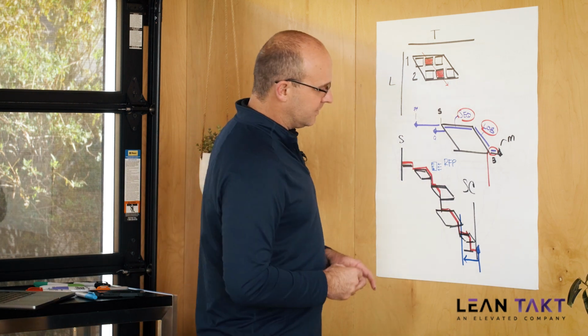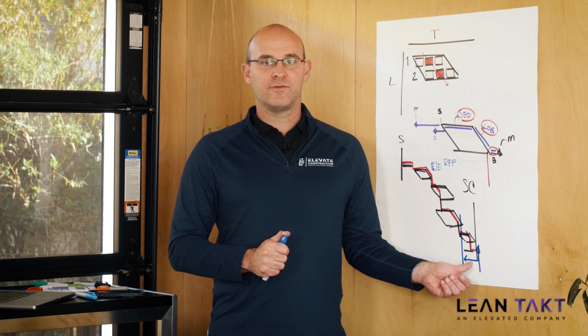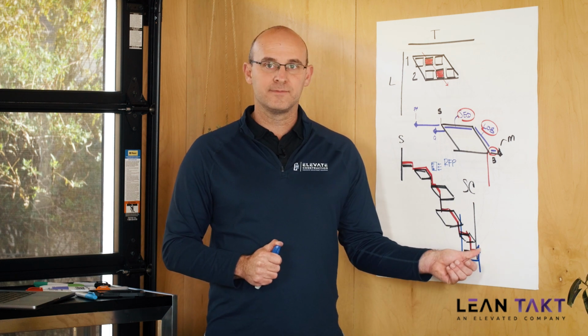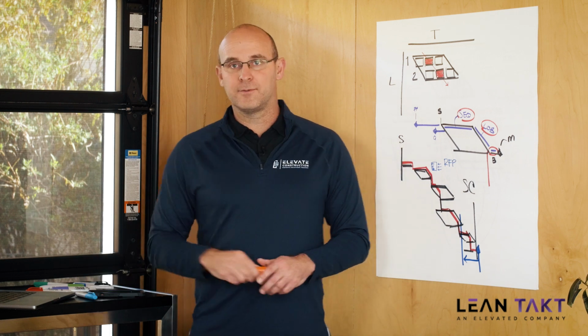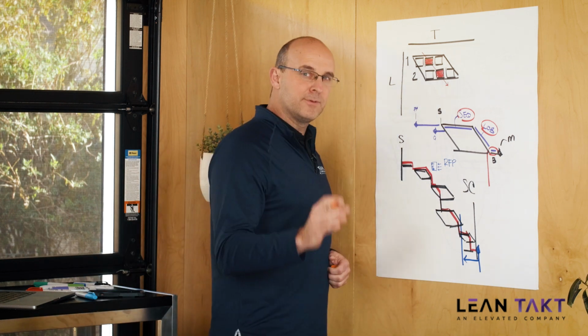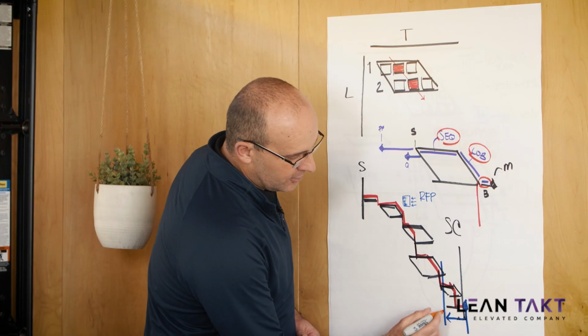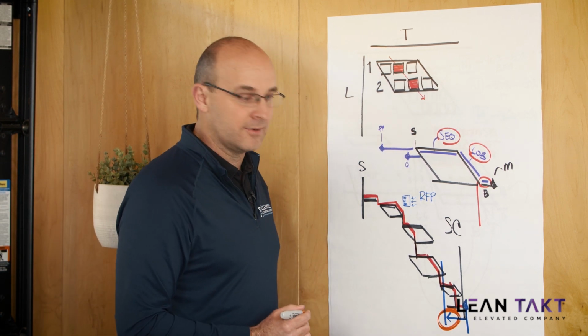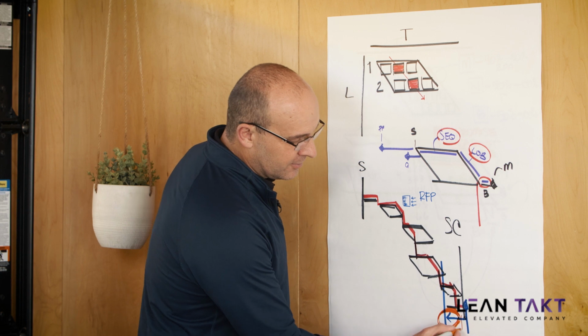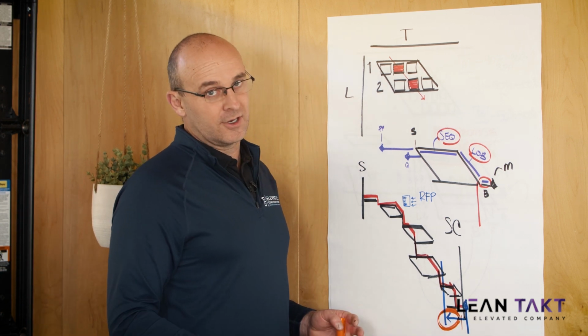Now, some of you will be telling me, hey, Jason, it's not fair to target this and then to finish like 3 months sooner. Hey, that's a fair point, and I agree with you. But what people don't understand is you're going to use up at least 2/3 of that buffer that you gain. You're going to finish earlier, but you're only going to finish by 1 or 2 weeks early or a couple of days.